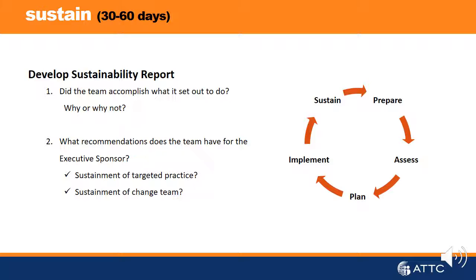The final phase of the OPII process is a sustainability assessment and report. The facilitator supports the change team in a summative review of their successes and progress in achieving their stated goals. The focus of the change team deliberations at this meeting are twofold. First, did we accomplish our goals? What lessons did we learn? Second, what are the team's recommendations going forward, both with regard to sustainment of the targeted practice and the continuation and adaptation of the change team?